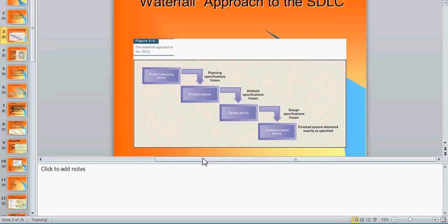Now you're trying to build it, or you are in the analysis phase. You are limited by the $300,000 and the 3 months. Remember, that's what the traditional approach is, right? You only gather the requirements that you can build in the parameters that you have agreed upon in the previous phase. Yes or no?